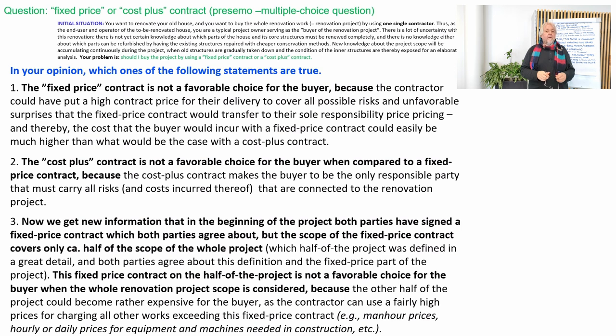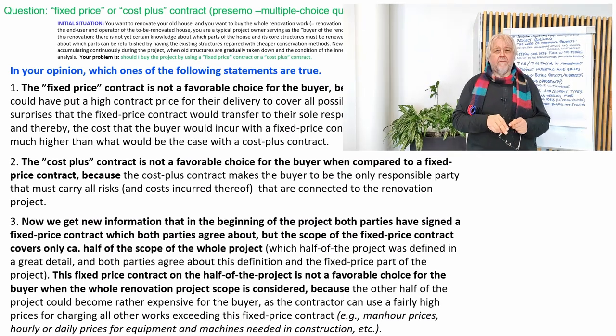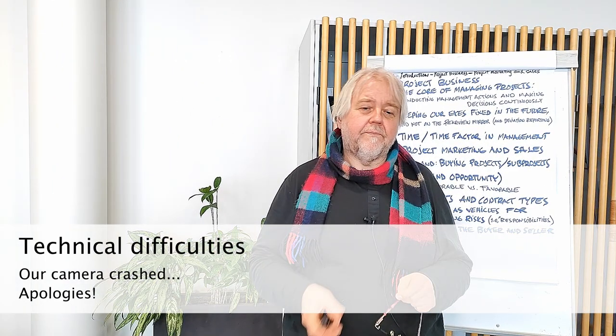And if the customer needs to change the fixed price part of the project, that will become really expensive for the customer, because then the supplier can claim that he needs a lot of compensation for changing his plans and everything that he has been so much prepared for. Okay.